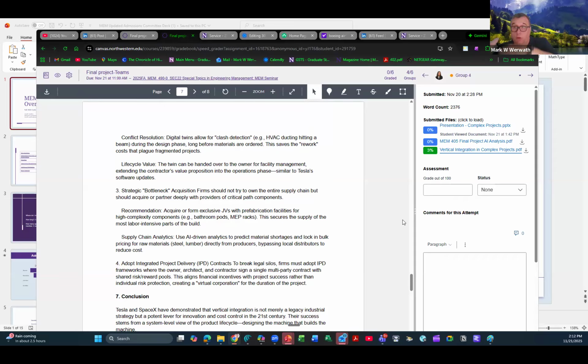And you can, glad you brought that up. It works both ways, right? The model can update the system and the system can update the model. Right. So often these digital twins of the construction project get handed over to asset management, who keep the models updated as they replace equipment in the building.